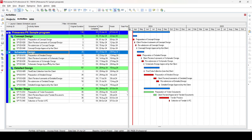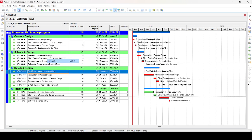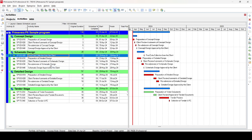Press Ctrl+Z to undo and return to the original state. Now for the cut-and-paste scenario: it was agreed that the final data collection would be provided in the Detail Design stage, but the client managed to provide the information in the Schematic Design stage, potentially saving time. We want to move this activity completely from the Detail Design stage to the Schematic Design stage. Select the activity, right-click and select Cut, then go to the Schematic Design stage and Paste. The activity is now fully in the Schematic Design stage.